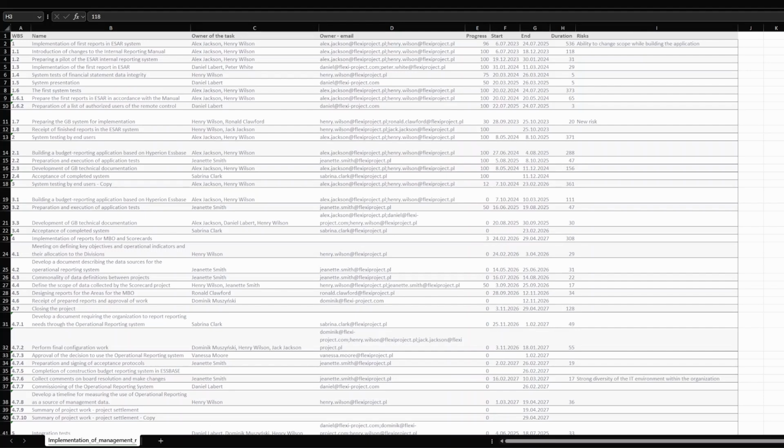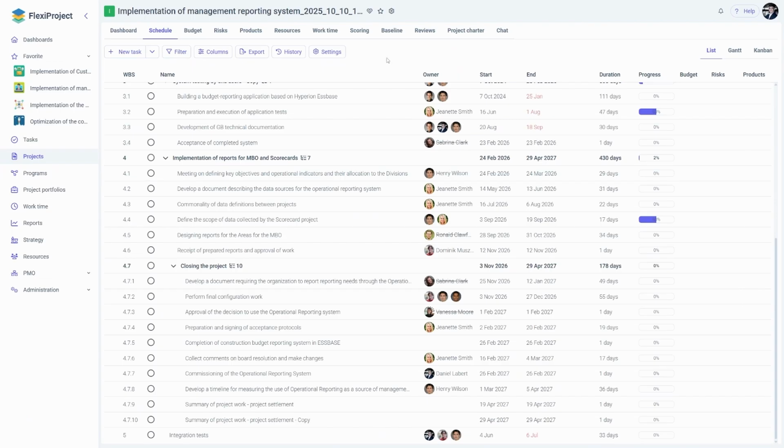It should be a kind of database file, containing unique values for WBS and names in subsequent rows. These will be the most important elements. Actually, just the name is enough for us to import a given project. Any other columns are not mandatory. Therefore, if your goal is to transfer a simple task list from Excel quickly, just ensure your tasks are listed in a column. However, I strongly encourage using the WBS structure with numbering if your project utilizes subtasks or distinct phases, as this will preserve the hierarchical relationships during the import.